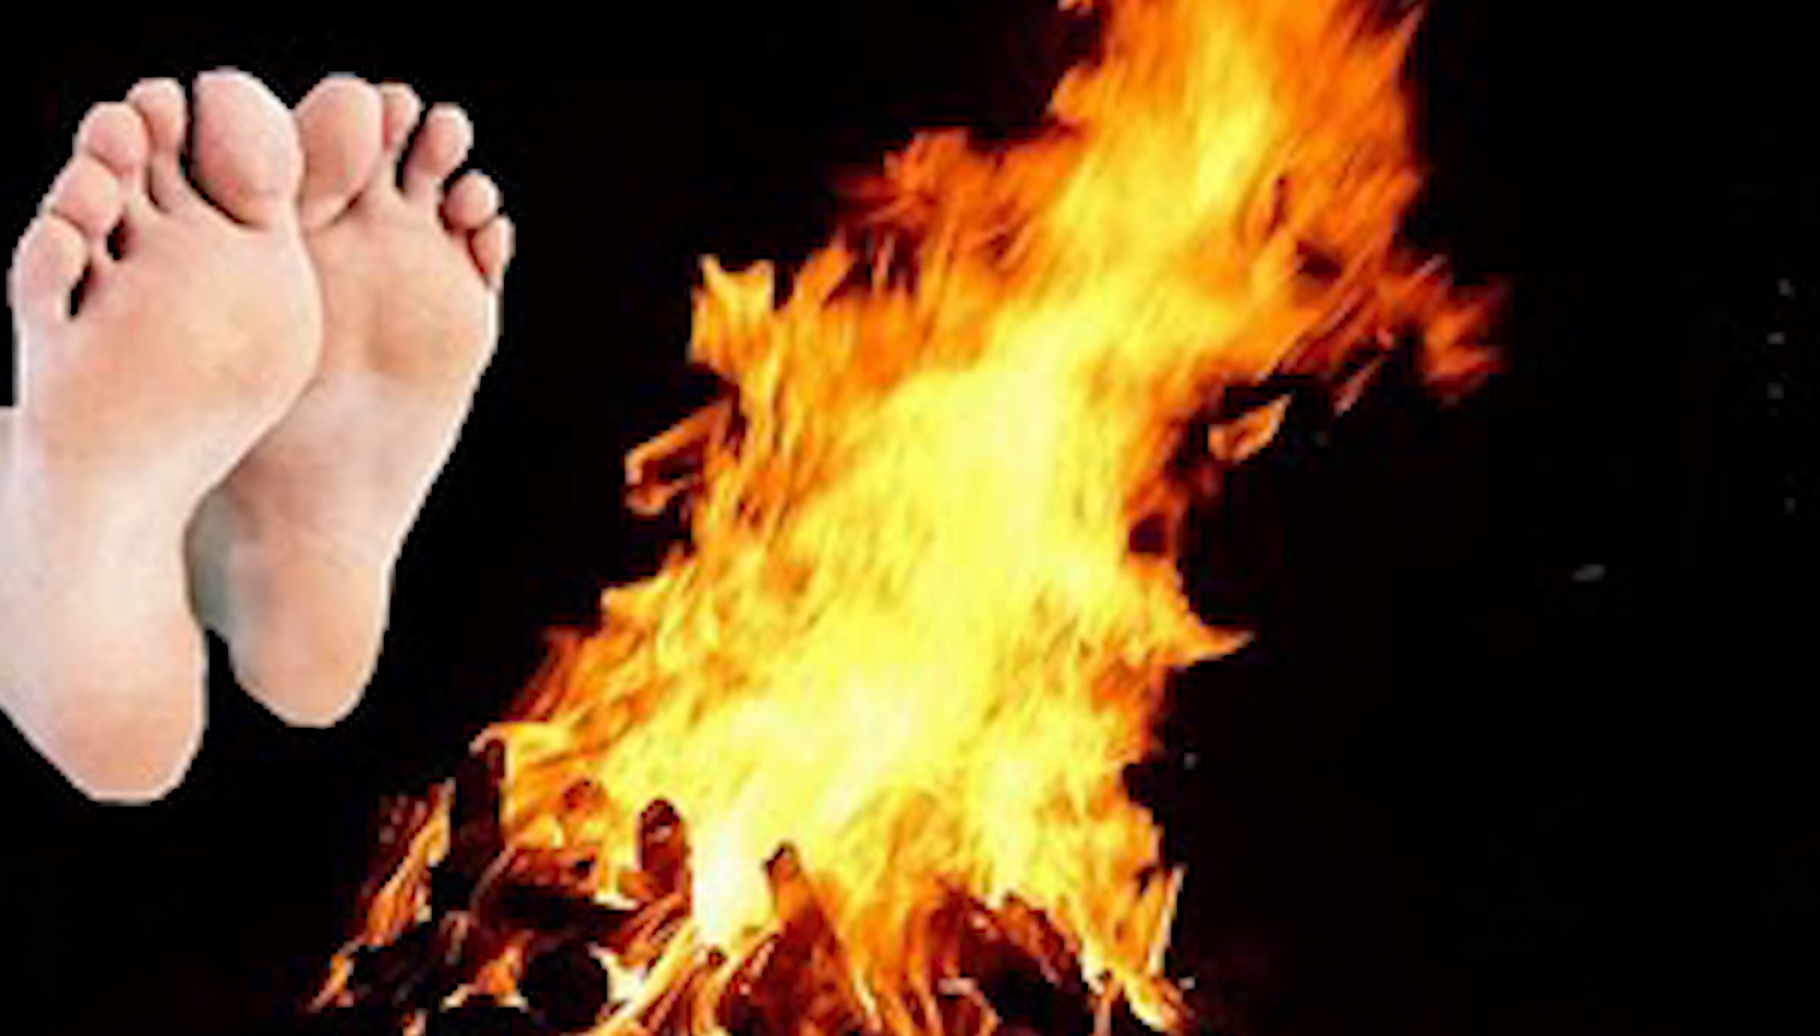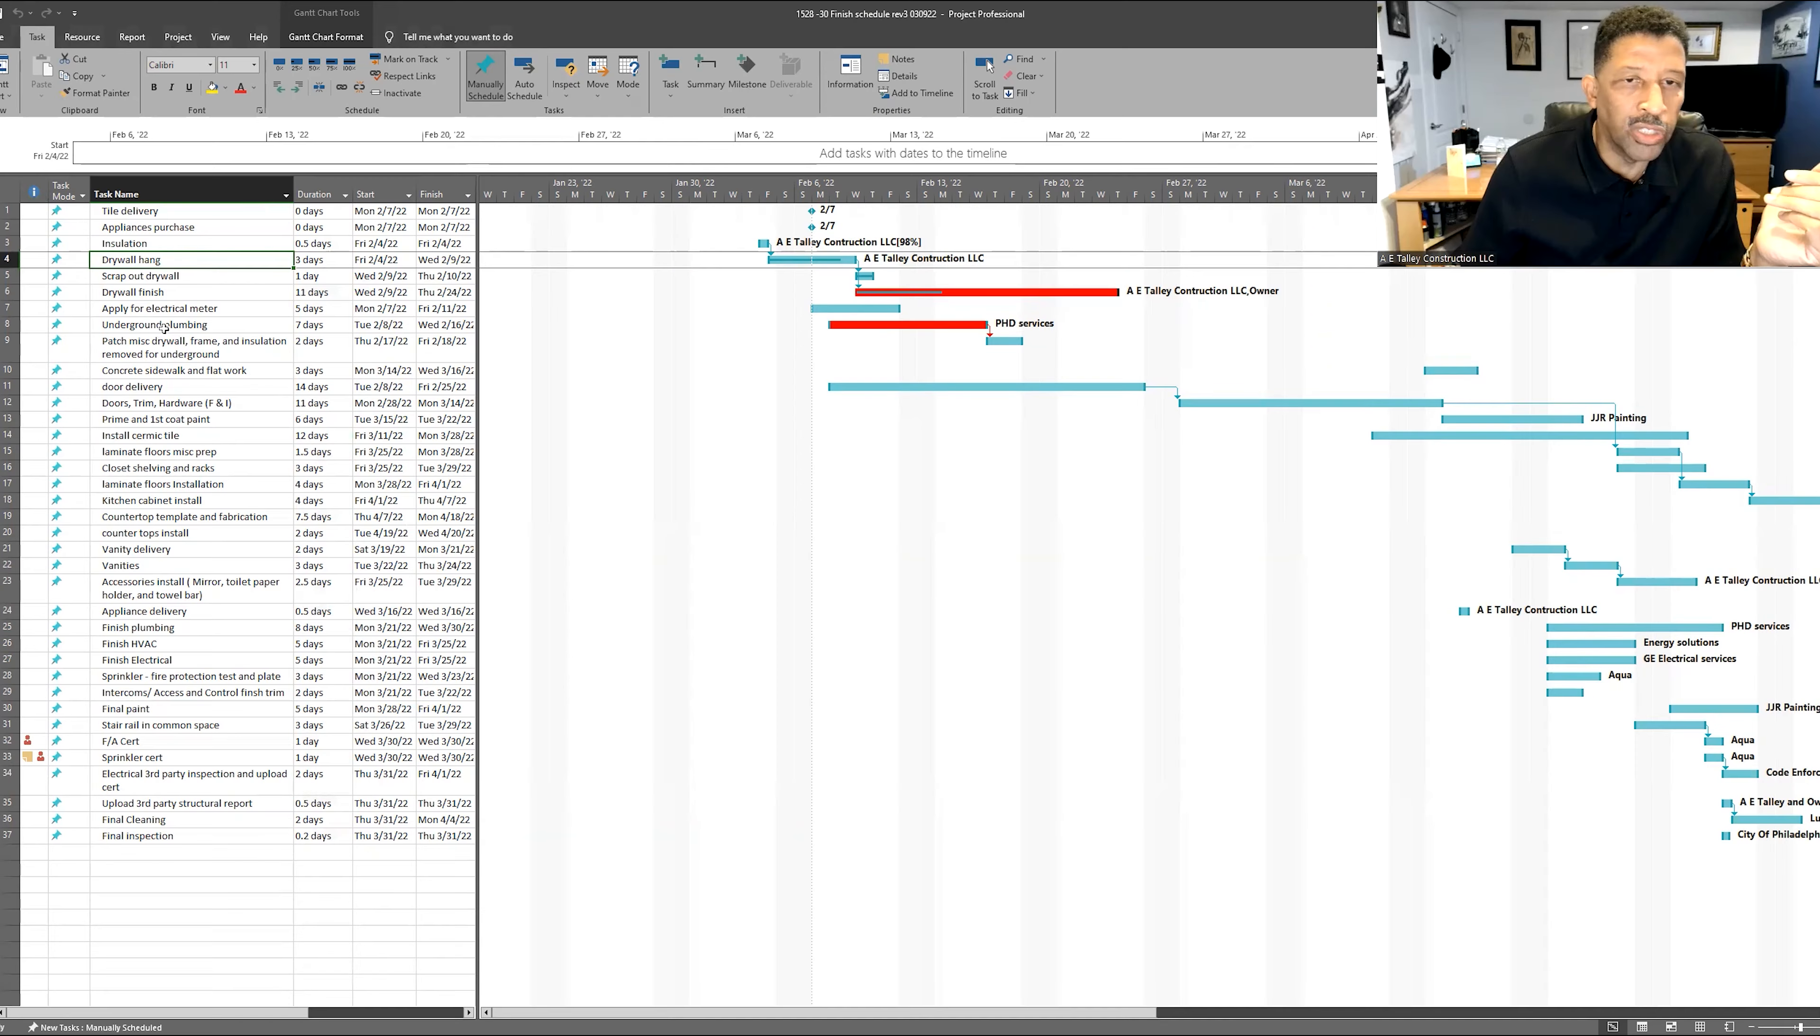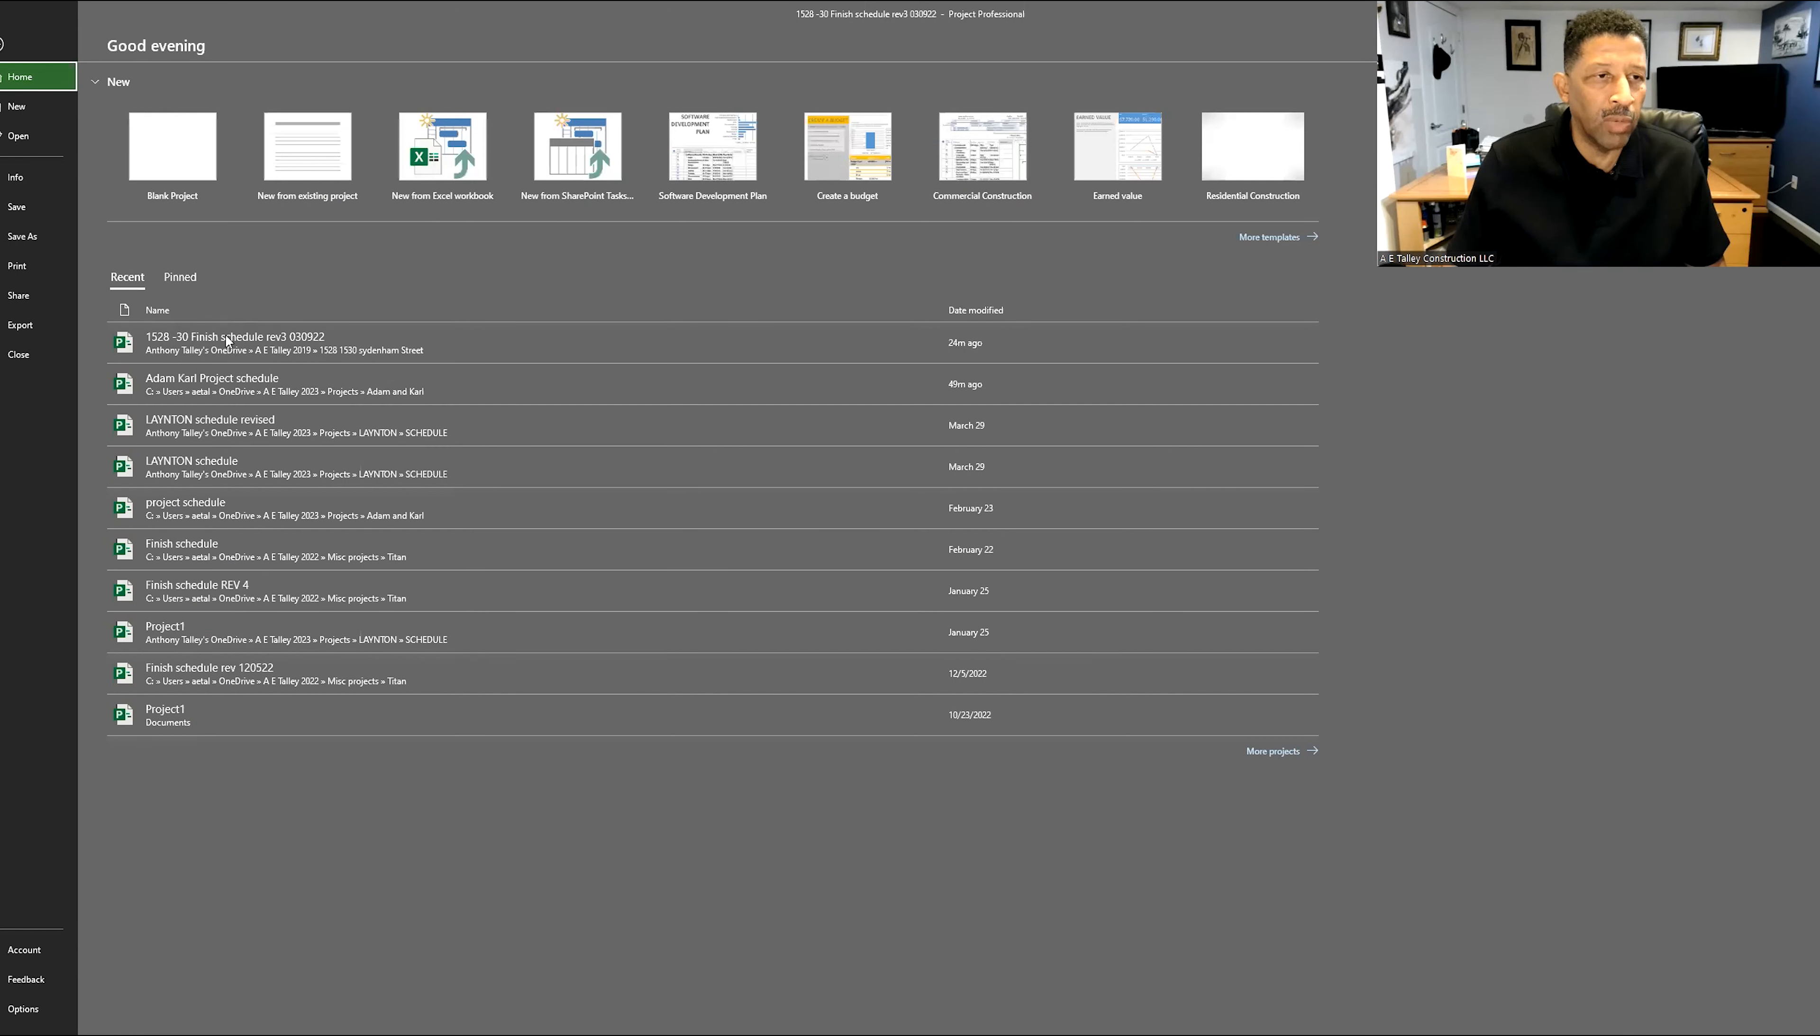So, back to the line items here. They can be as simple as pouring concrete or scrapping out drywall, applying for the electrical meter, which in turn, we are able to push back on the owner to say, you're supposed to apply for the electrical meter. Here's the date you're supposed to apply for it. We don't really want to have any issues, and you seeming that we're holding you up with actuality, you're holding us up because you haven't complied with the schedule and what you need to do. So, it's really important to go over a schedule or to use a schedule.